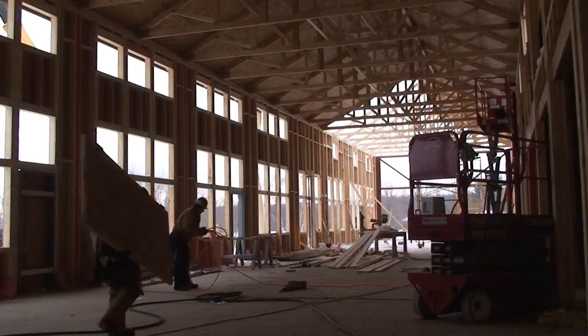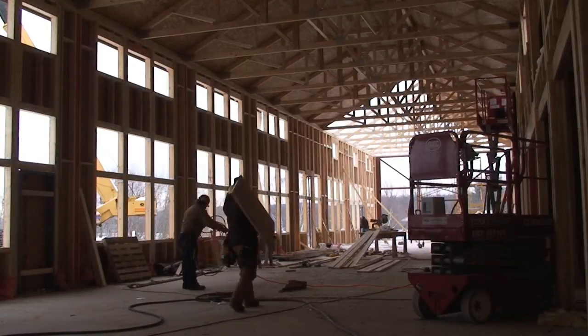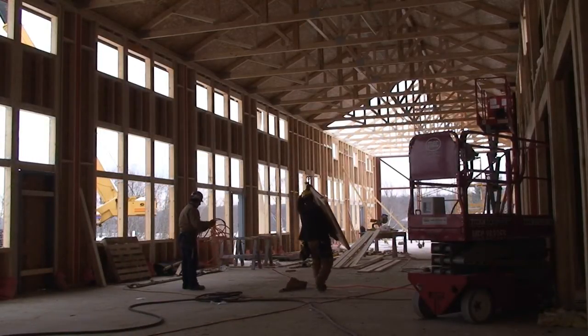Hit the ground running with submittals, color selections. A lot of items were already predetermined, so things were turned around rather quickly from the architect and from the owner. And that all happened in pre-construction, and it saved time when we got to the turnover date, when they gave us the old building and we were able to start tearing it down. So we had things in line, and we hit the ground running and didn't look back.